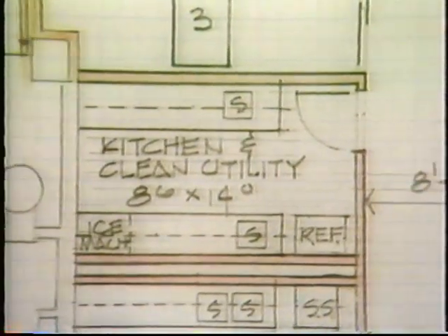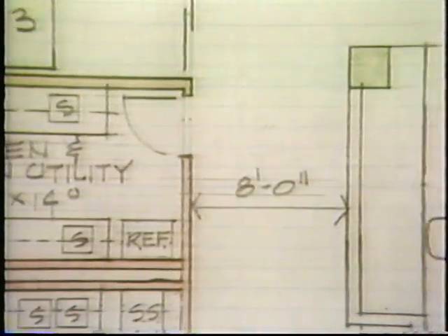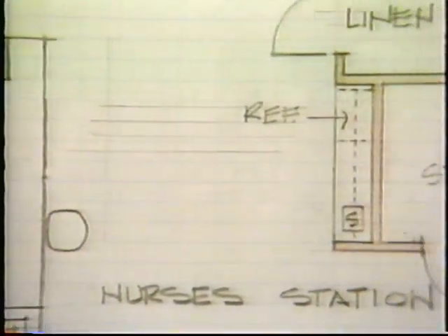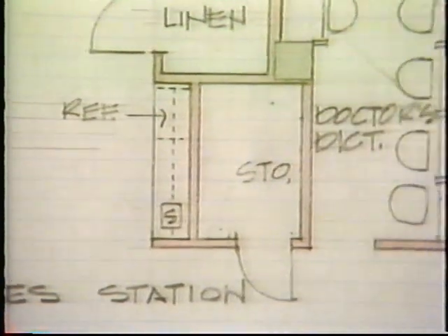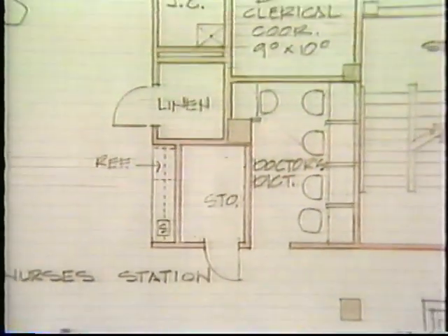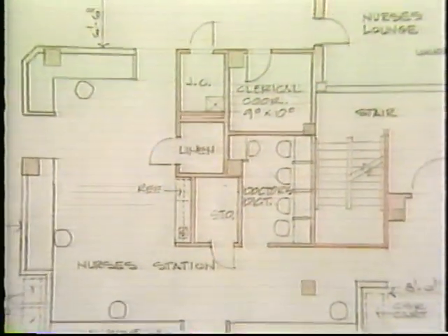These design development drawings reflect all the spatial, furniture, and equipment needs of this ICU project. The architect's intention in design development is to freeze all design decisions so construction documents can begin with minimal interruptions from the designers of the space. With this done, construction documents will begin.